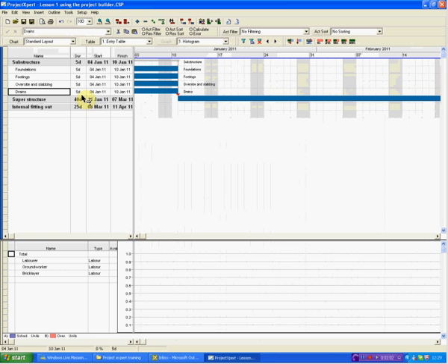Okay, now at the moment they've all got a 5-day allocation, so I'm going to scratch my head and think, right, yeah, that's foundations, yeah, we'll leave that at 5 days, and then we'll have 3 days to do the footings. The slab will probably take us a couple of days to do, and the drains, yeah, we better allow 4 days to do that. There's quite a lot of drainage to do.